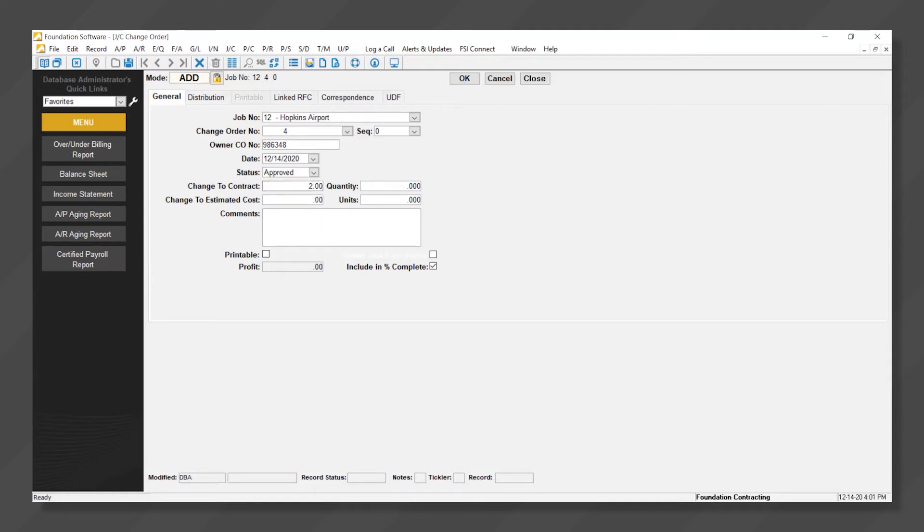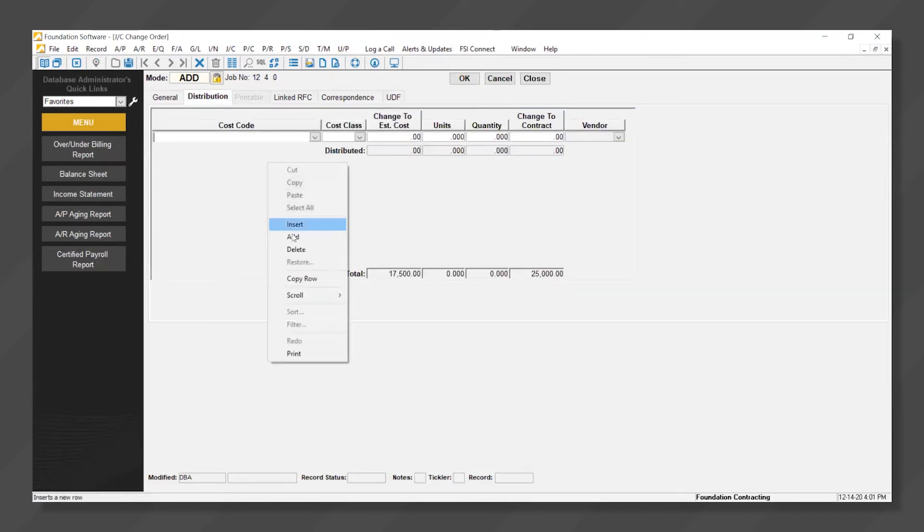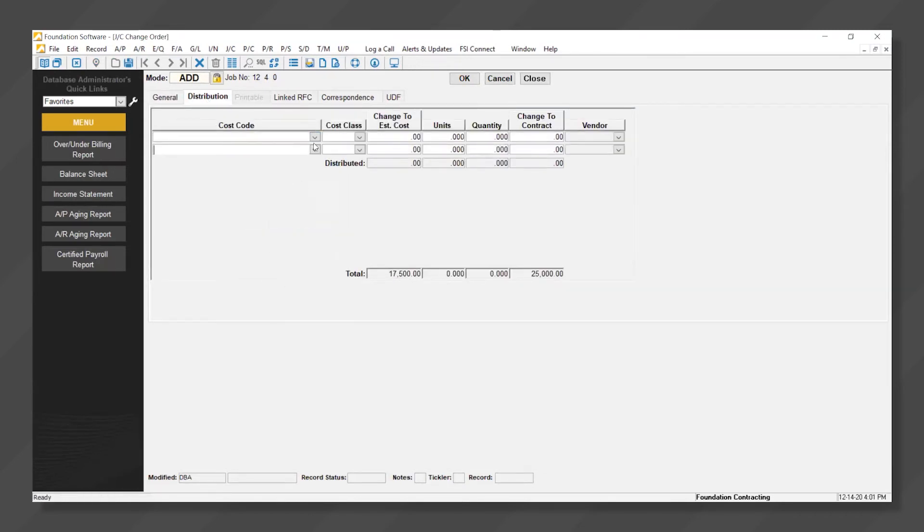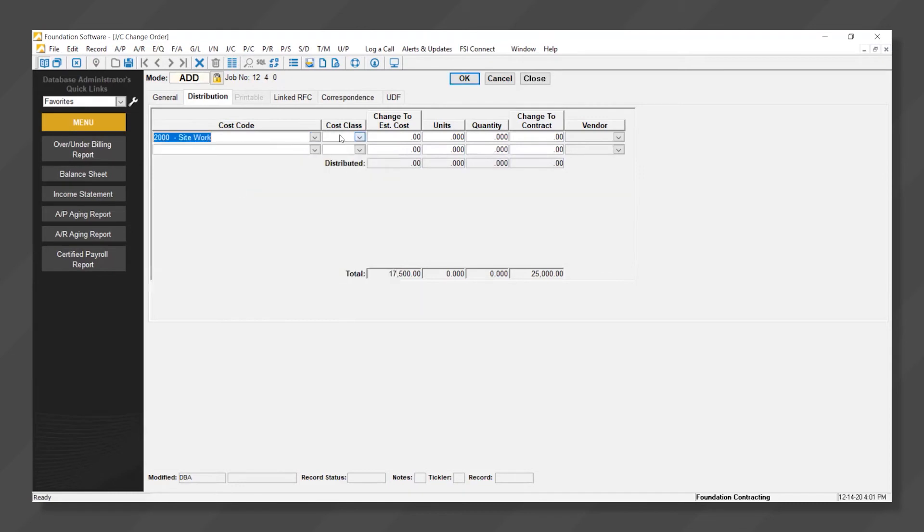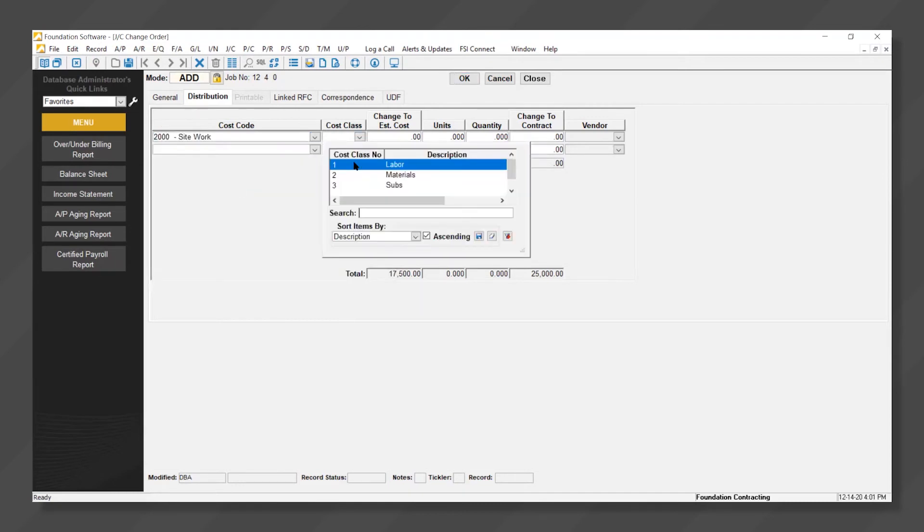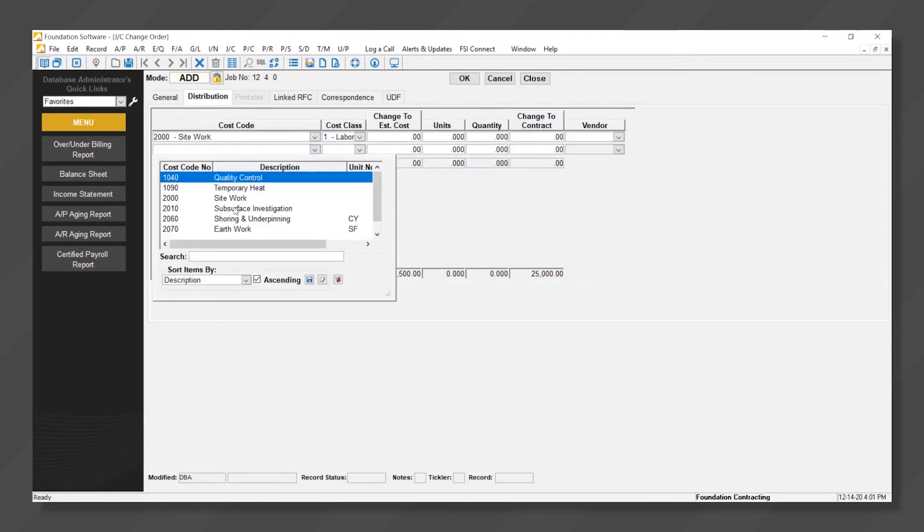We'll specify the increase of the contract, and we can also specify the increase of our budget as a result. Now our increased budgeted costs can be distributed to various cost codes and cost classes depending on how that budget increase needs to be divided up.